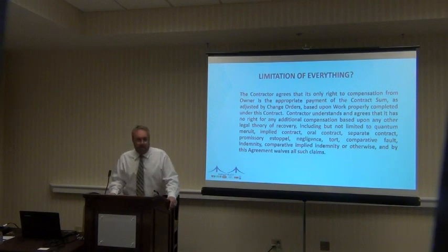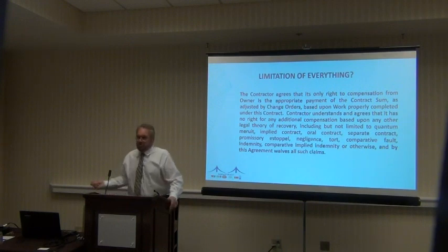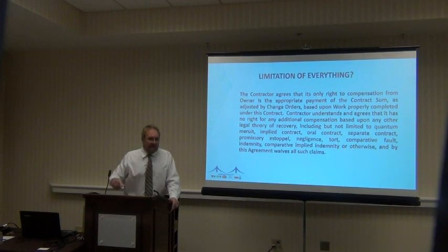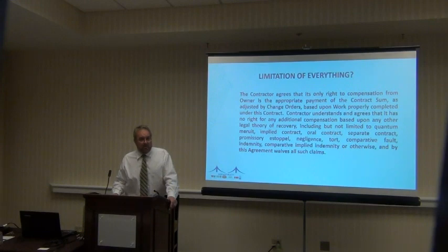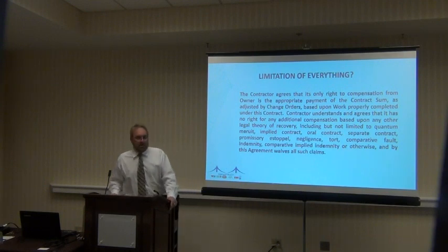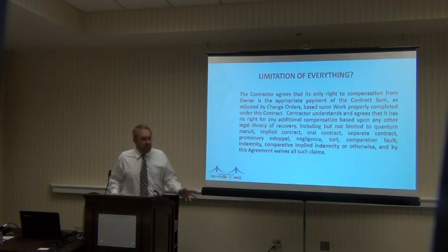How come? Why wouldn't you sign up to that? Anybody want to venture a first swash with the sword? Because you're waiving all claims against any additional compensation unless you have a written statement. And not only that, it's got a pretty, and this is now more my world than it is y'all's, but it's got a pretty all-encompassing laundry list of legal causes of action. There's not a whole lot more left in the legal world of claims and causes of action that the lawyers can articulate to try to pull a rabbit out of the hat on this deal.